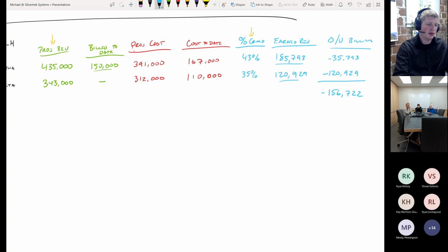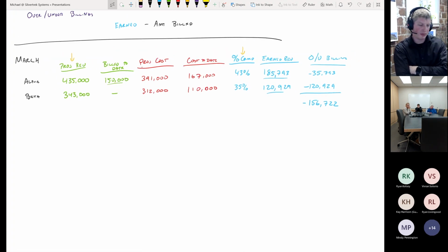So let's take a step back here and look at what we're seeing on alpha and beta. So first of all, we don't have all the information here to make all of the necessary analysis for whether alpha project manager and beta project manager are doing their jobs correctly. For one thing, although we calculated that alpha was 10% profit, we don't have what the original contract amount was here, so we're not exactly sure whether they're doing better or worse than originally bid. That's an important piece to understand if we have the to know whether or not the project manager is doing well.